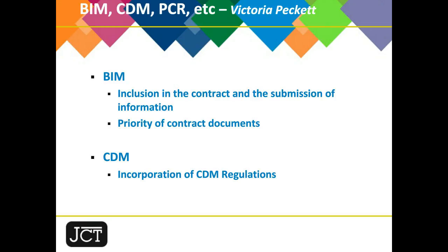Now, we are also all aware that there are BIM protocols out there that try to give the BIM protocol priority over all other contract conditions. That's not consistent with JCT's approach, so JCT has modified clause 1.3 to make it clear that no matter what any other contract document says, it doesn't override the terms and conditions. The view that JCT has is that there shouldn't really be anything in the protocol that overrides or modifies the terms and conditions anyway, so it shouldn't be an issue that arises in practice, but just in case, there it is, we still have priority for the terms and conditions.